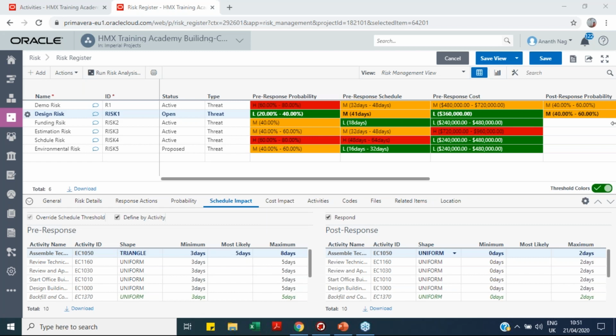Yeah. So basically, you have something defined as a budget and something calculated through the estimates you have done. The estimate will be taken into consideration for calculation purposes. Once you have a risk identified and a mitigation plan on that, you have a cost associated with it, and that will be added on top of the estimate you have done. But this estimate should be within the budget. While the budgets are normally prepared, you have a budget for risk management also, so that will be part of this. To be frank, yes, you should have it as part of the budget, and you have a place where you can enter the detailed cost for mitigation and other things in Primavera.